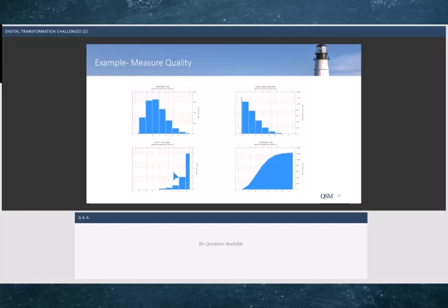You can see here we start where we're seeing defects regularly. We're not seeing a lot of time between defects initially, but then as we get closer to delivery, we can see on this particular release estimate, we're up to about 5 days before discovering a defect. And then here we can see the cumulative defects, about 1,200 defects overall on this release within the transformation.